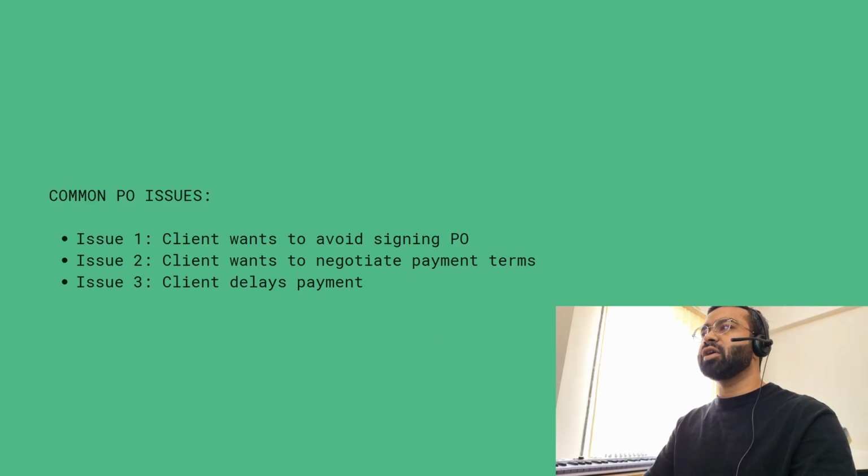Day 45 passes, no payment. You email Jane: invoice XYZ for milestone 1. Payment of $80,000 is now 15 days overdue. Per the PO, payment is due net 30 days from invoice date. Can you confirm when we can expect payment? This is impacting our project schedule and the team allocation.